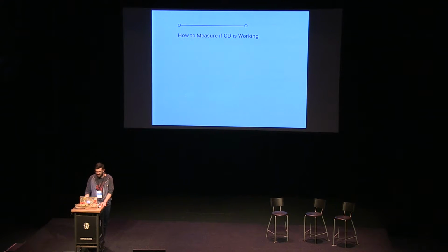This is the same as Agile, where you want to look at the cycle time and the work in progress. And if these are high, then you want to debug the process. This is where at Wrangle we felt a pain point, because our mobile applications, even if they were simpler than our web apps and websites, often had a higher work in progress and cycle time. For example, if you have 3 devs working on several stories, you have multiple PRs open. If you're waiting until the very end for testing, there's the cost of the context switch: the tester finds an issue, it might have to go back to the dev, and the dev has moved on to another story. So we want to try and minimize this.